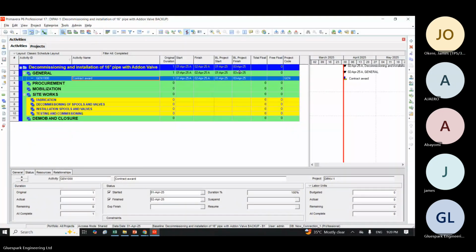55 milestones were generated along the line within the execution months. They were not planned at the beginning. At the beginning, they planned to do 72, and at the end of December, they finished 76. But inside the 76, 55 of them were not included in what was planned.